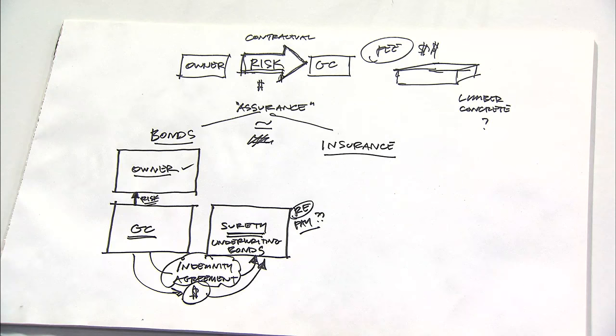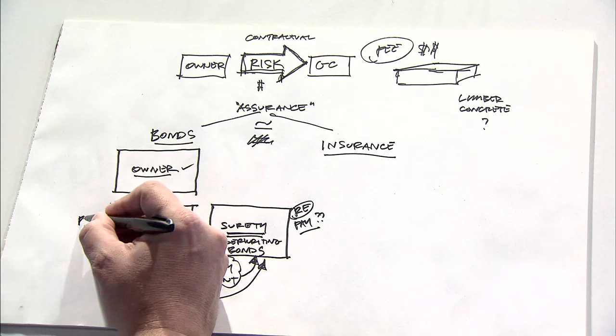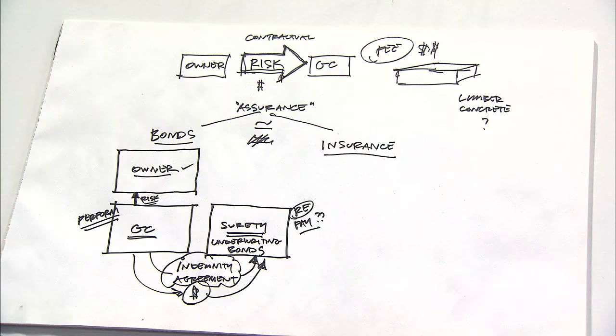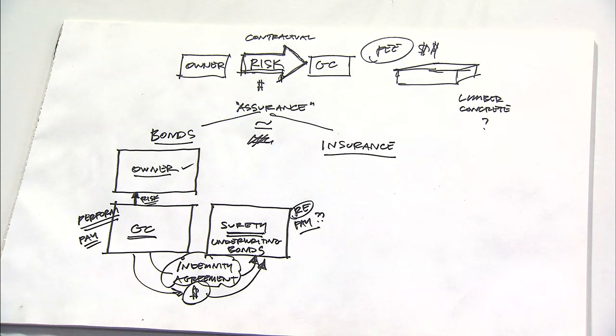And many times, the owner says there are two fundamental types. One is that the contractor must perform the work satisfactorily. And second is that the contractor must make payments to material men, suppliers, and subcontractors, and so forth.